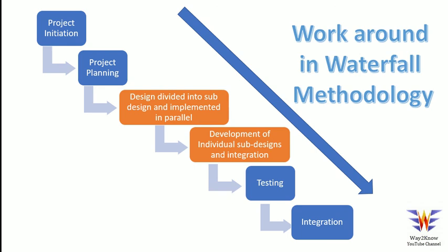For example, let us assume we are doing an embedded hardware board, with a main card and a daughter card, and also some test boards that need to be developed. Rather than a single team developing it, you divide it so that one team does the main card, a team has the daughter card, and another team does the test boards.